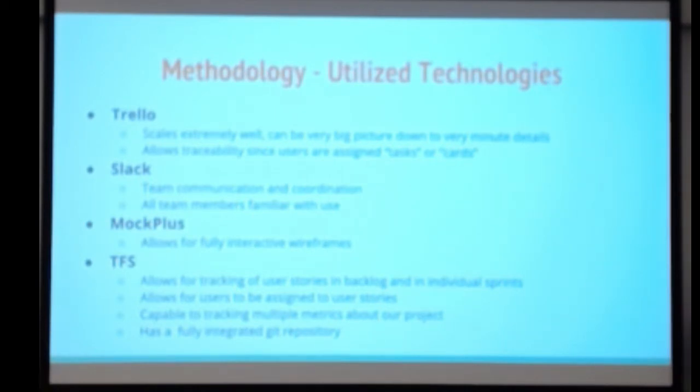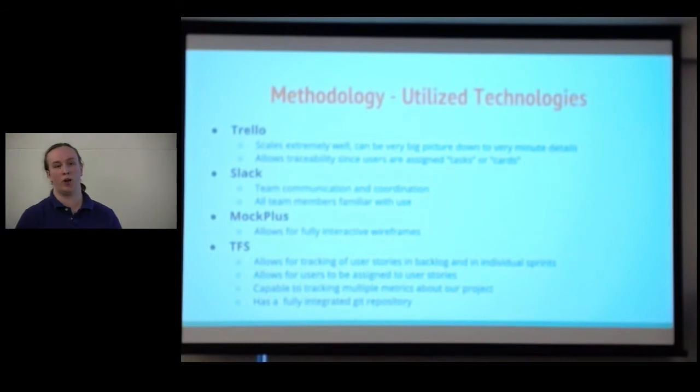Mock Plus is a big important one. Mock Plus is what we use to develop wireframes. They're interactive wireframes. So every week or every couple weeks, we develop an interactive wireframe of what we think the product should look like. We then either present it to Wegmans in meetings, or we send it to them outside of the meeting so they can review it internally. And this gives us a really quick turnaround on fixing problems with the user experience that we won't have to go back on later. So we can sort of continuously build up to these big wireframes.